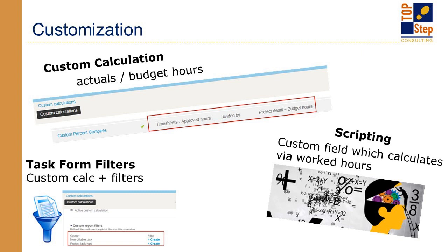However, you don't want, and maybe you're planning out pre-sales and budgeting, say, 50 hours of pre-sales, but you don't want those hours to factor into your percent complete for the project as a whole, for example. So if I set up a task type of pre-sales, or maybe even check the box that says non-billable using something on that task form,